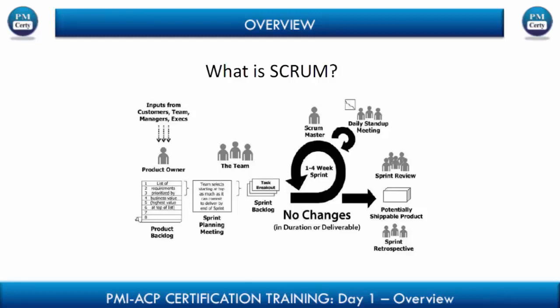We have the whole end-to-end planning of the requirements in a release plan, the entire set of requirements in something called a product backlog. These 2 terms are common across both the worlds of Agile as well as Scrum. Then we talked about a sprint, which is nothing but an iteration in the Agile world. We also understood these are time boxed into a particular period of time. They can vary from as little to 2 weeks to as much as 6 weeks. But once we freeze that box of time, every subsequent iteration or sprint has to be of the same period. That means if we have chosen 4 weeks, every subsequent sprint or iteration must be of 4 weeks only.